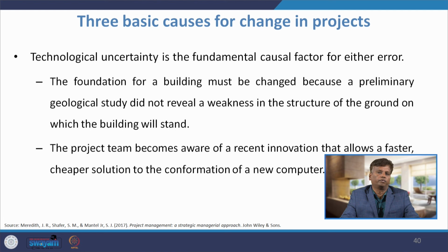Suppose at the time of the project proposal, there may be one technology. Now, at the time of implementing the project, there may be another technology. So, we need to make the change. For example, the foundation for a building must be changed because a preliminary geological study did not reveal a weakness in the structure of the ground on which the building will stand.